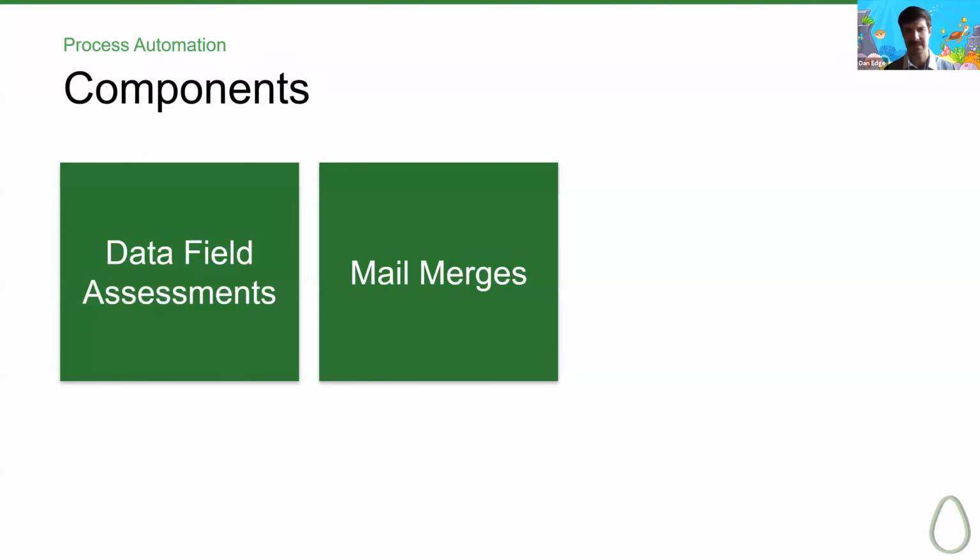Just recently, I implemented a contractor pay app process for reviewing and approving pay apps. And this isn't always an easy transition, especially for an accounting team that has received paper hard copies in a particular format that's been around for longer than I've been alive. But being able to mail merge a document that looks the same way as it did on paper really helped instill confidence in the team and promote adoption of the system. Ultimately, now this client is processing construction pay apps faster than they used to in the past.